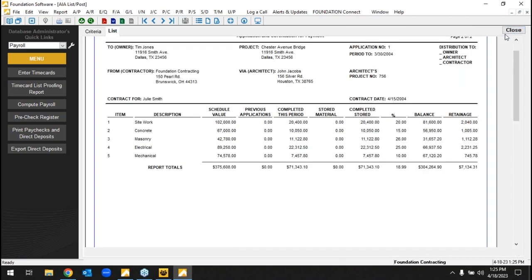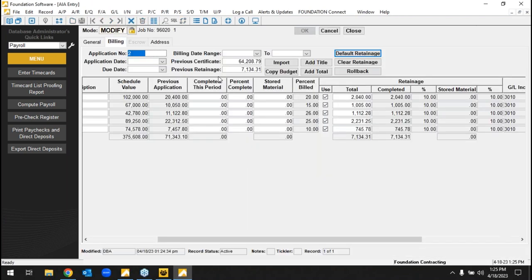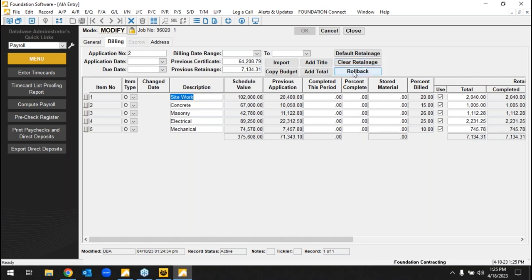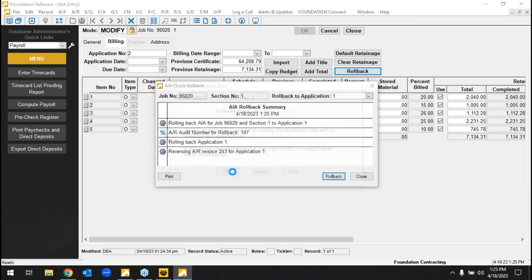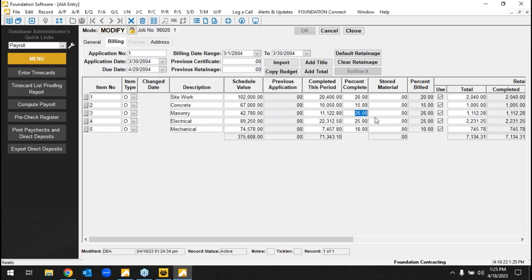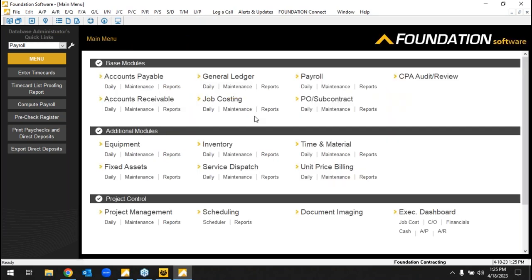Now on AIA screen we're on application number two — previous is growing as things progress. I can release retainage anytime, or hit rollback to go backwards and make a correction. All I did was hit rollback and hit OK, and we're pushed back to application one. Behind the scenes there is an audit trail showing who did it and when — but the end user doesn't have to press 50 buttons to get backwards and make a correction. There are also optional billing modules: T&M for larger cost-plus billing situations, and unit price billing focused on quantity complete.